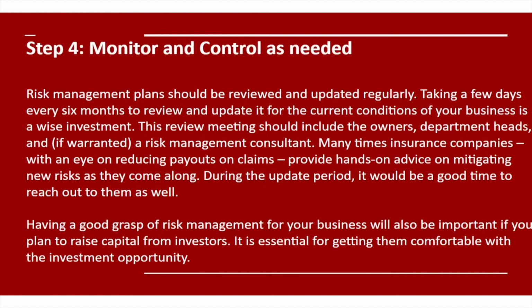The fourth and final step is monitor and control as needed. Your risk management plan should always be reviewed and updated regularly, taking a few days every 6 months to review what you've got. It should include the owners, department heads, and risk management consultants, if you have them, depending on how big you are. Insurance companies are going to keep an eye on this sort of thing.